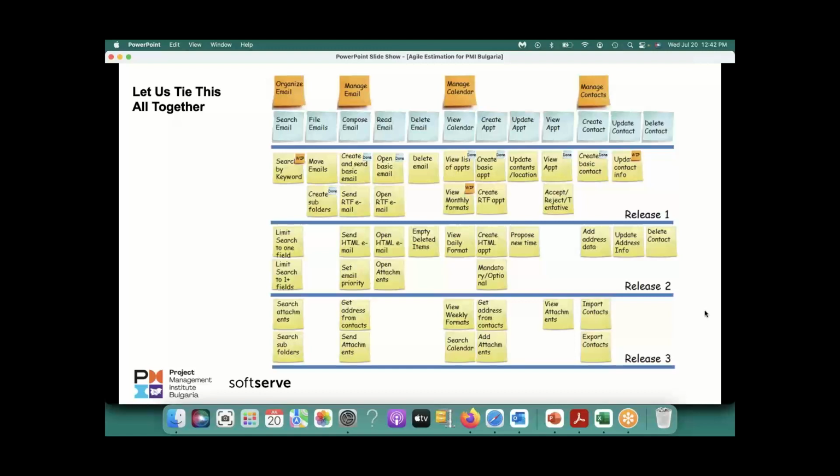Okay, very good. So what you do is, let's say you have a release, and there are several epics and stories and all that. So you have prioritized them, and then you have, let's say in this case, 6 sprints. Okay, so you don't have to go and detail out stories or epics for all 6 sprints. Okay, you don't. What you do is, at any point of time, you should have detailed out, or we call it groomed, stories worth next 2 sprints. Every time you should be ready with that. So when you start your first sprint, before that, you should groom stories worth 2 sprints. Okay, you don't have to do any more than that.